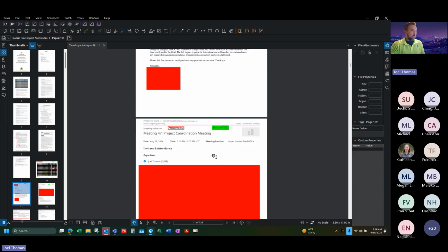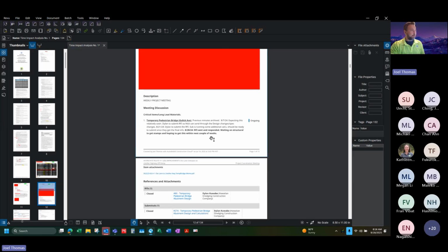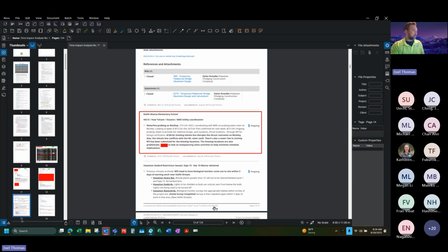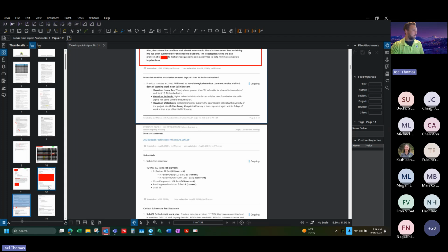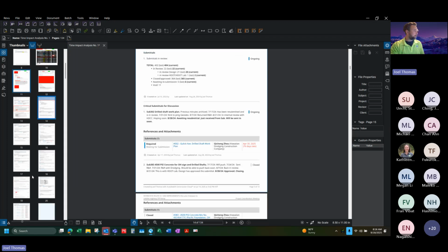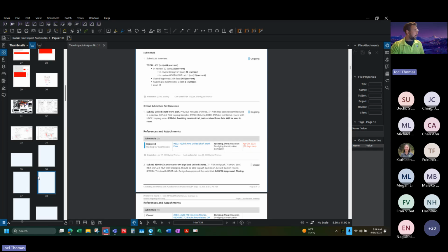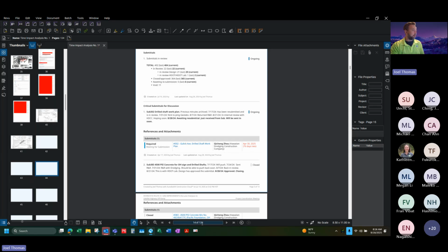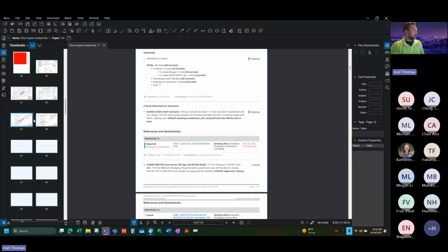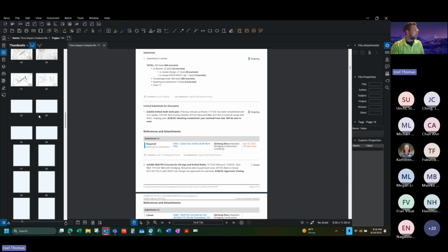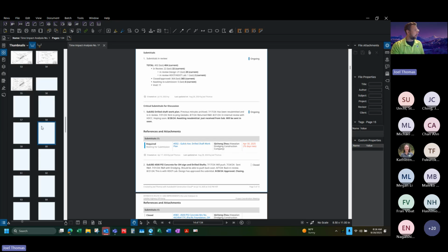And then I included meeting minutes where we discussed, and I think it was here where it came up, saying that the line stop locations, and so on. So it's anything you can put in here that justifies what you were talking about up above. And one other thing that I was putting in here, sorry, this is 134 pages of my RFIs in here that caused the delay. It's just backup information for an auditor or whoever wants to look through it all.